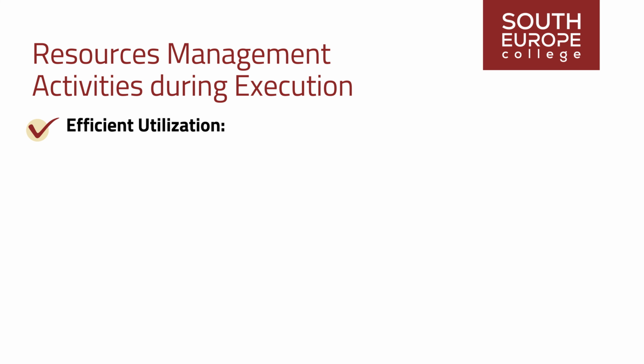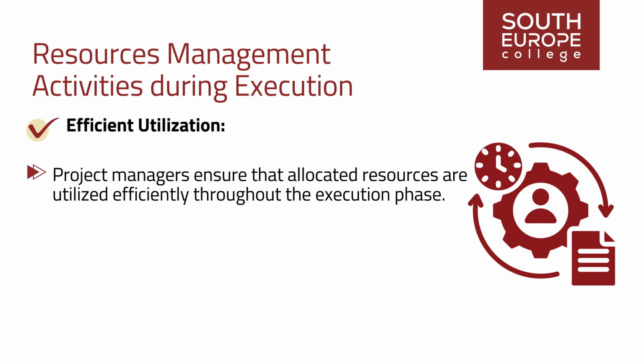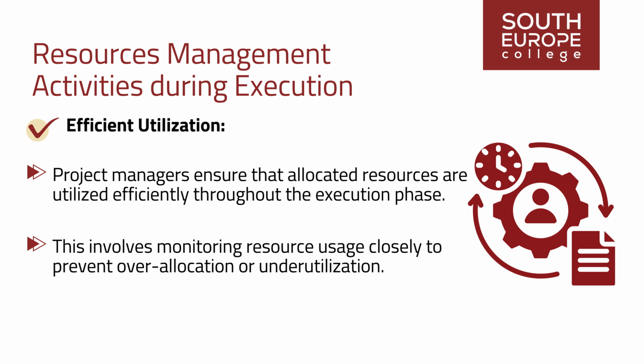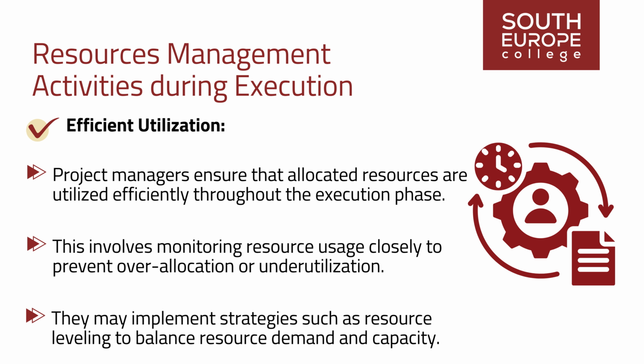Efficient utilization. Project managers ensure that allocated resources are utilized efficiently throughout the execution phase. This involves monitoring resource usage closely to prevent over-allocation or underutilization. They may implement strategies such as resource leveling to balance resource demand and capacity, ensuring that resources are neither overworked nor idle.